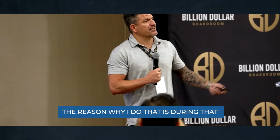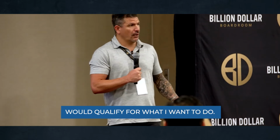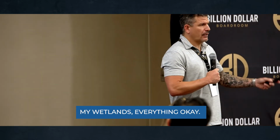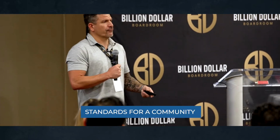The reason why I do that is during that due diligence period, I'm doing my Bugs and Bunny report, I'm doing my surveys, I'm doing everything I have to do to make sure that the property would qualify for what I want to do, my wetlands, everything, okay? So now I see if it meets the preliminary standards for a community and it meets the county's requirements, I go, I can plot this thing out and I can create 95 homes here.